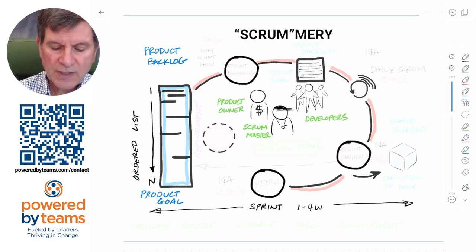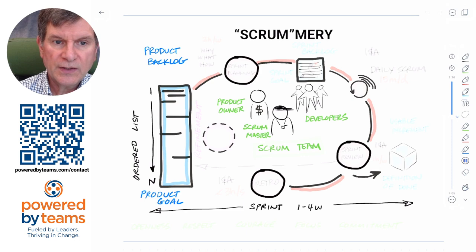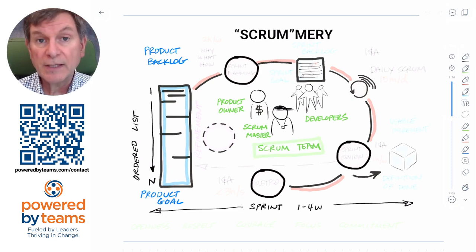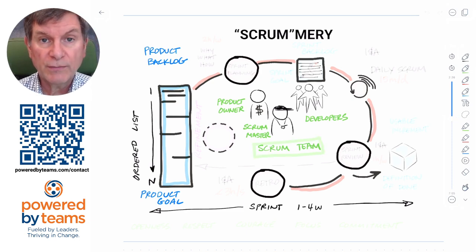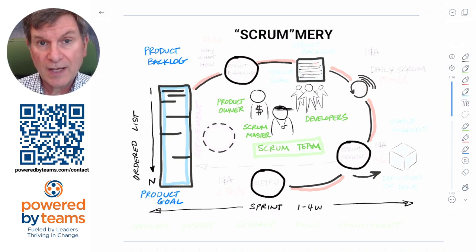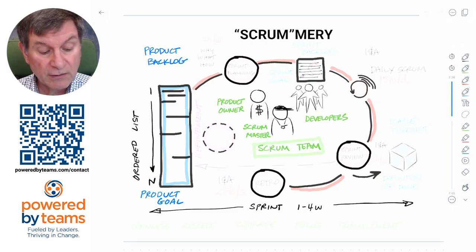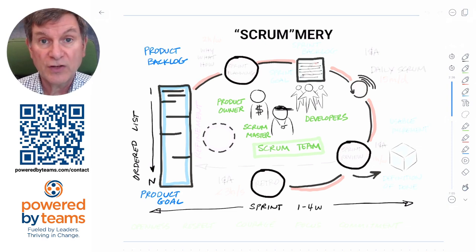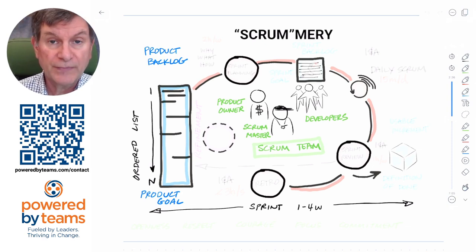All three of those accountabilities are held within a Scrum team, which is a group of 10 people or less when you include the product owner and the Scrum master — just big enough to accomplish something significant, but small enough that there are no handoffs even in communication, particularly since that's a cross-functional team.